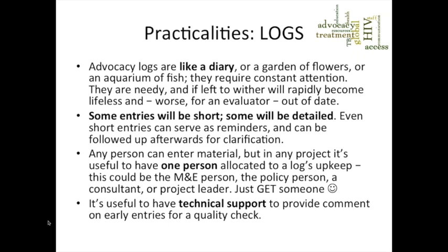And also in all the projects I've worked with using advocacy logs, it's good to have technical support. Just send it to somebody. Is this kind of information going to be helpful? As a consultant doing M&E, they'd probably send that to me, but it can be anybody, just so that somebody's getting comments on what they're putting in, so that after 3 years we haven't got a log that's full of stuff that isn't really very useful. So it's a quality check, really.